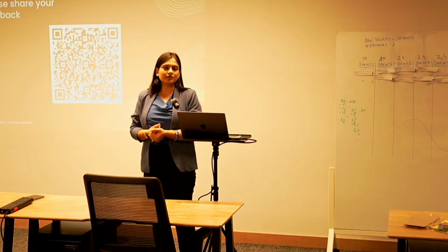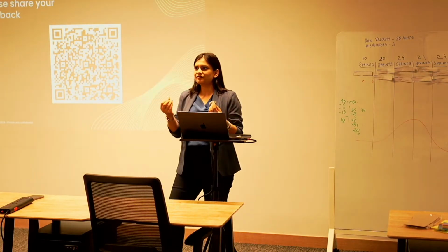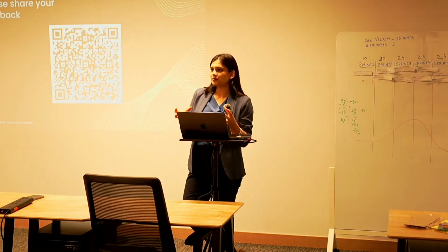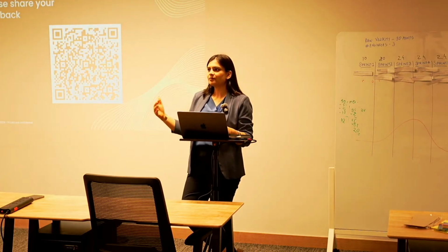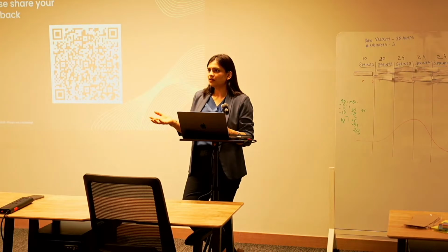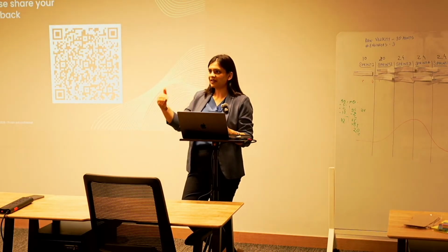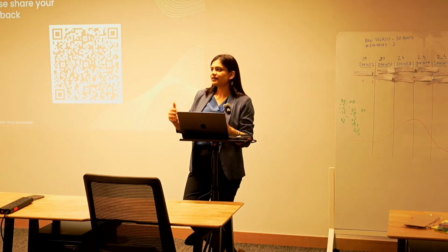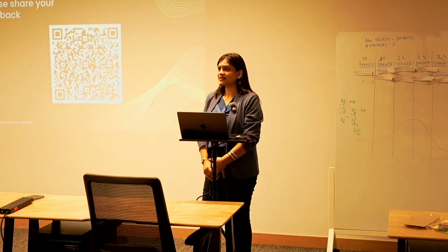And also it depends on the amount of time it's going to take for you to develop a feature, even if it's the bare minimum. So I think it depends on the scope of work and the requirements that the client has, but we try to do incremental releases as much as possible. Ideally every 2 sprints or even every 1 sprint, if we can release something slowly, I think that is really advised.